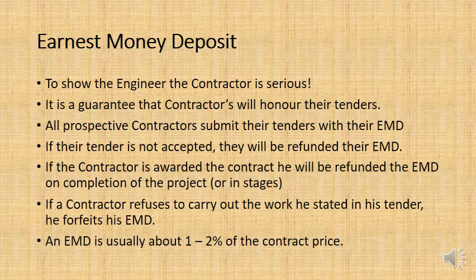Now, if I get awarded the contract, that means I will be refunded this EMD, this earnest money deposit, when I complete the project or at agreed stages. Or if I don't get awarded the contract and my tender is not accepted, they will resend my earnest money deposit. So what is the purpose of doing this? Well, it's to make sure that you're serious.